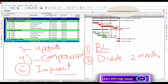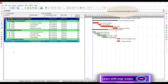Many people ask why we use windows analysis. The first reason is that it's a retrospective methodology — when the project is done and you're on the edge of project completion but not in a position to deliver as per the contractual completion date, you carry out windows analysis to determine how much the delays have impacted your project.